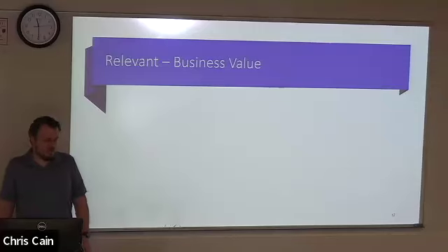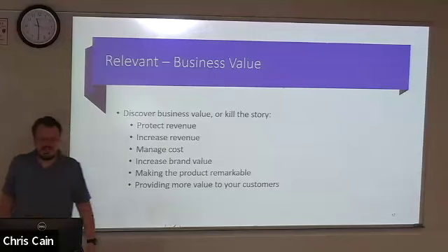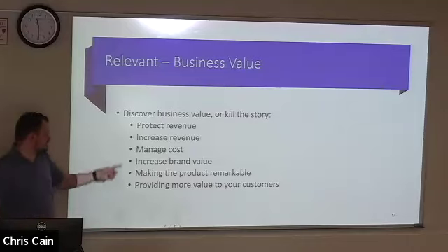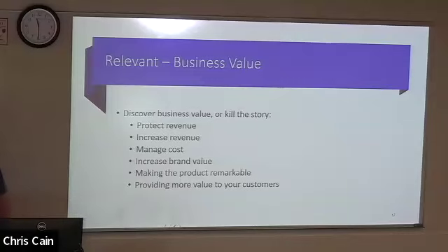Relevance, you should think about the associated business value. What is this going to do for your client? For a particular user story, figure out why does this matter? Does it protect revenue? Does it increase revenue? Does it manage the cost? Does it increase the brand's value? Does it make the product better or more famous in some capacity? Does it provide value to the customers of the product? Think about the why behind it. If there's no real why behind your user story, kill it. It's not relevant.